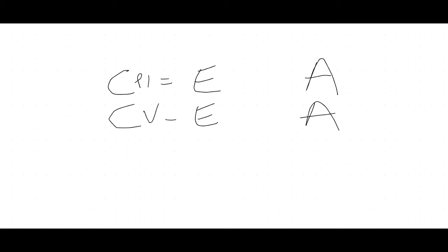E stands for earned value. Because the first one is an index, the mathematical function is division. Because it's an index, we divide. The second one is a variance. Because it's a variance, we subtract. So we have earned value minus actual cost.